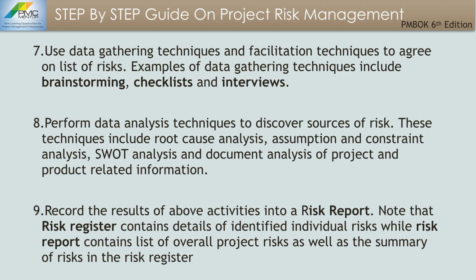Number 8, perform data analysis techniques to discover sources of risk. These techniques include root cause analysis for a previous problem that occurred, assumption and constraint analysis, SWOT analysis, as well as document analysis of project and product related information. Record the results of the above activities into a risk report.